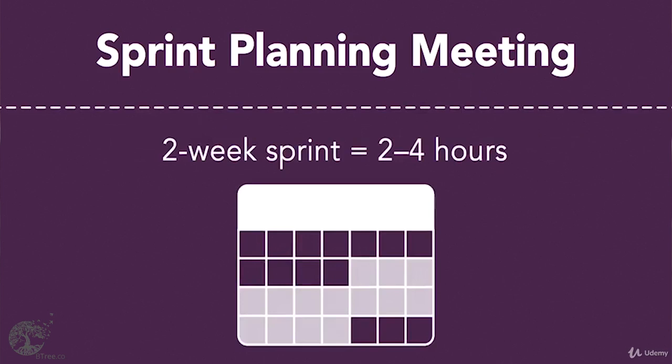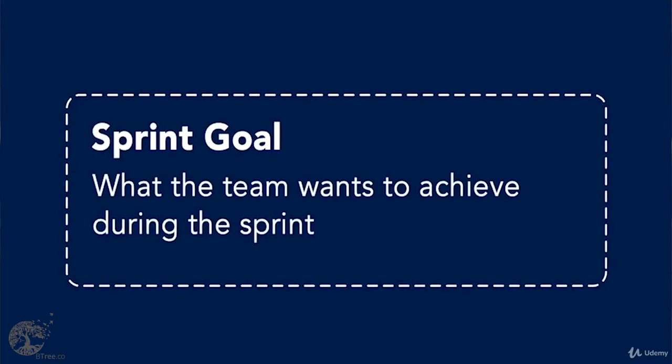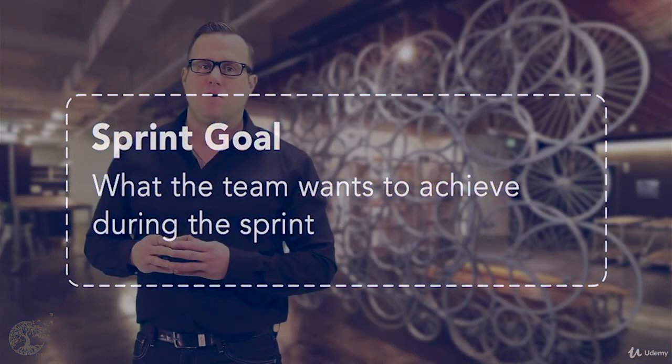Defining a good sprint goal is about writing a 1 or 2 sentence description of what the team wants to achieve during the sprint. Think of it as an elevator pitch. It's paramount that the product owner be a key part of defining this goal, and that we can link the goal to an upcoming release and customer value intentions.